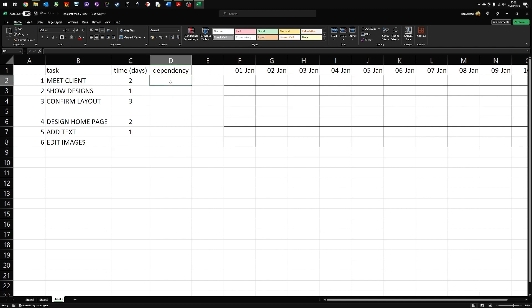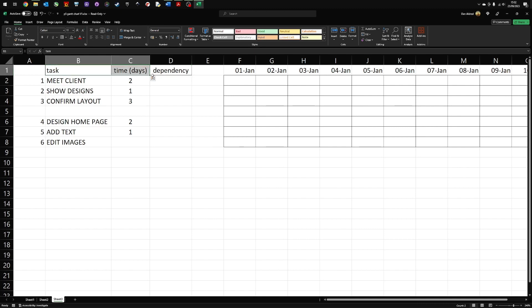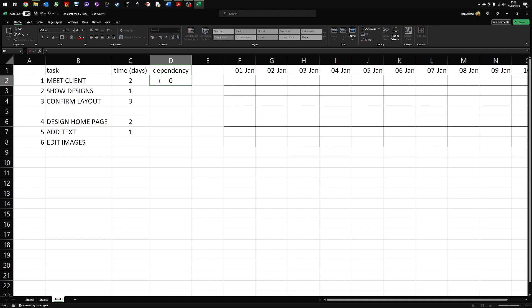The next section is to look at the dependencies. The dependencies is what task is dependent on the previous task. In other words, the question you are asking is, what do I have to complete before I can complete the next section? So for example, if I want to meet the client, is there anything that I have to do before? Well, there could be, I could phone them, etc., but I should really have added that to my list of tasks. So actually, for this example, there is no task that I need to complete before. So there's no dependency, zero.